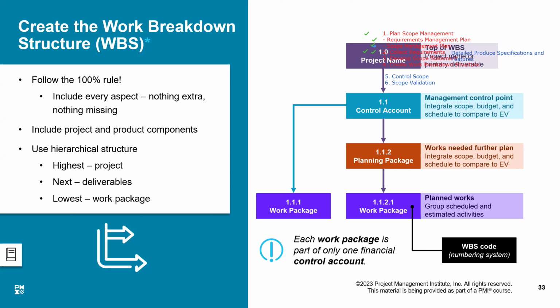Yes. So the wall is my work package, but activities are not mentioned here, and they are not supposed to be. Why? Because the project manager is interested in following up on work packages, not on activities. There are so many activities, and they are the responsibility of the supervisor who is actually handling them. Exactly.